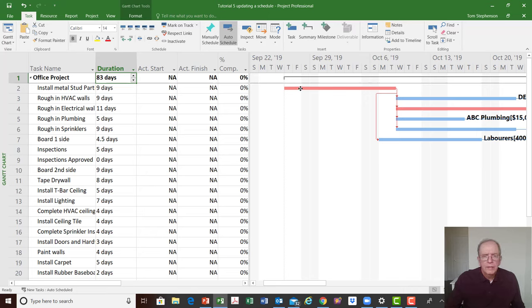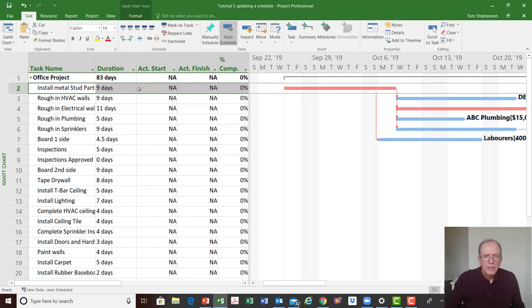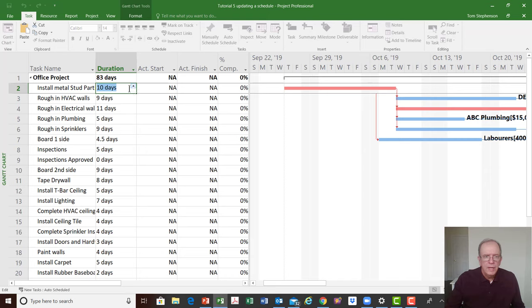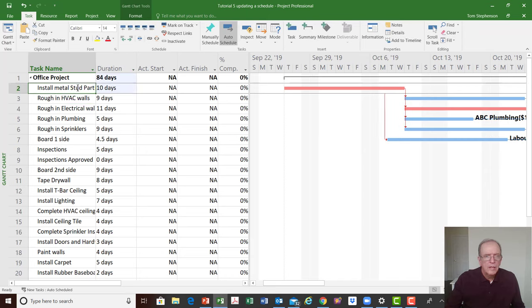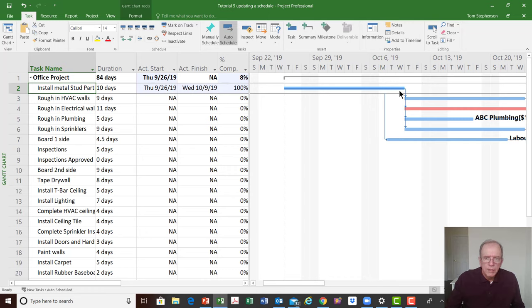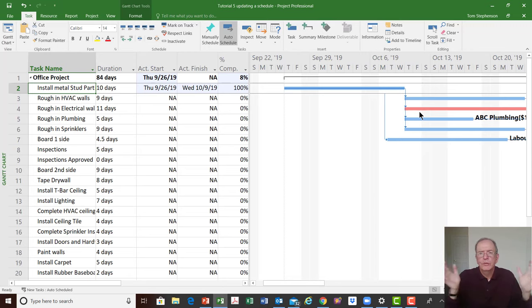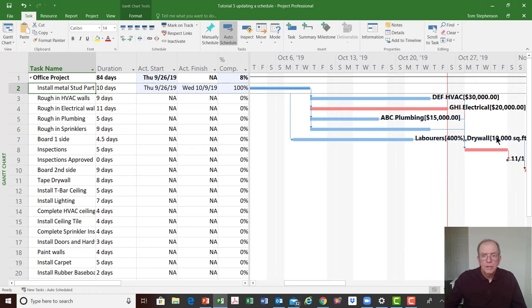I'm going to say that with this first activity we actually started on time but it took 10 days to complete — so I'll enter 10 days, which made it longer, and say it's 100% done. When I did that it put in the actual start and actual finish dates according to what was already there, made it longer because I said it took longer. It put a dark bar through the Gantt bar — it's no longer shown as critical because if it's done, it's done. It won't drive the project anymore and it won't show red.